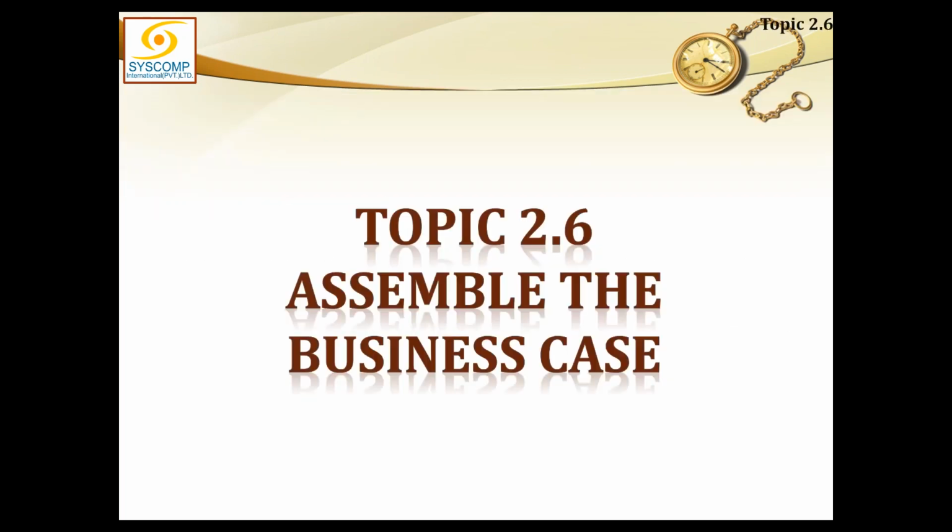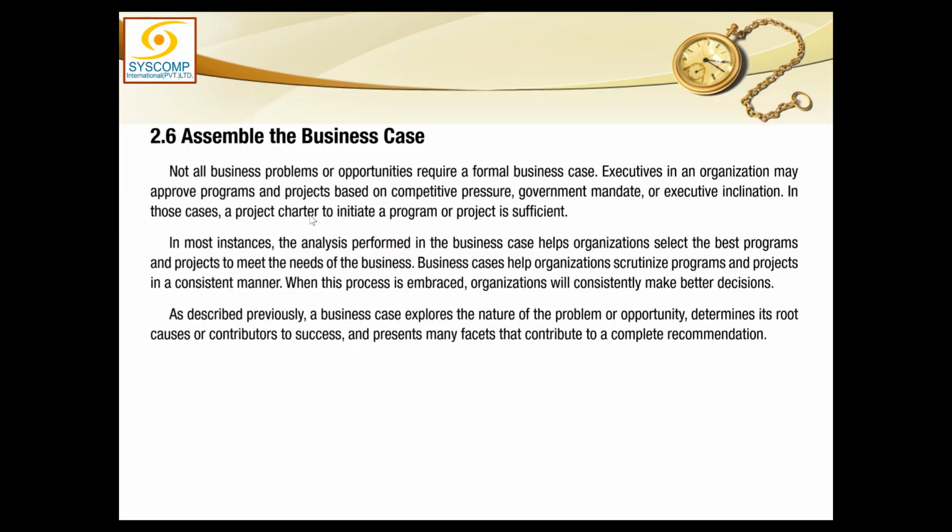आखिर में हम असेंबल करते हैं बिजनेस केस को। ये आखिरी एक दो स्लाइडें हैं। Not all business problems or opportunities require a formal business case. Executives in an organization may approve programs and projects based on competitive pressure, government mandate, and executive inclination. In those cases, a project charter to initiate a project or program is sufficient. वो कहते हैं जी, ऐसा भी हो सकता है कि आप डायरेक्टली चार्टर निकाल दें, लेकिन इन सम केसेस देयर विल बी अ रिक्वायरमेंट फॉर अ बिजनेस केस, तो फिर बिजनेस केस बनाना पड़ेगा।